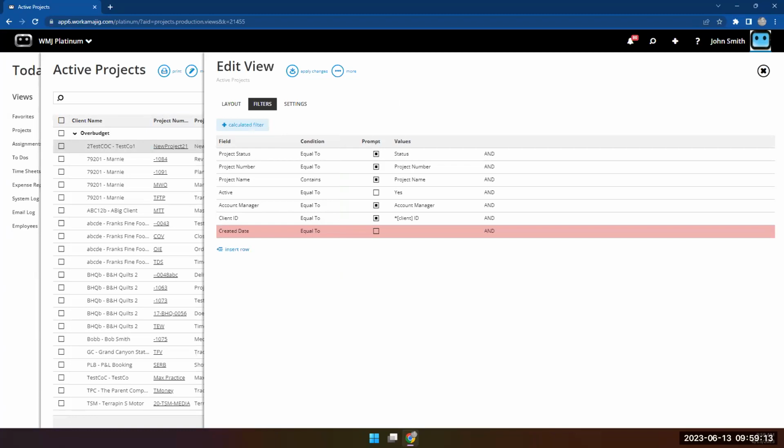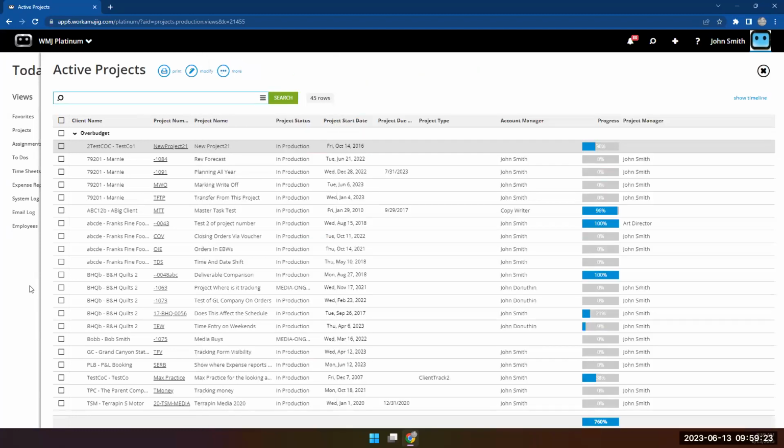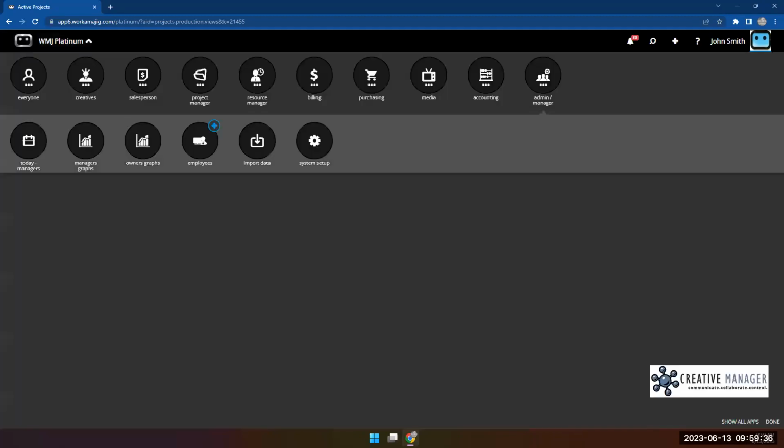Okay, I want to pull billable hours, but I want to exclude those users who are not billable. Okay, so when you say not billable, that has two connotations. Not billable for us would be they have a zero rate. They're putting time in, but there's a zero rate on it. So that's actually a fairly simple one. Let me get back to my timesheet one.